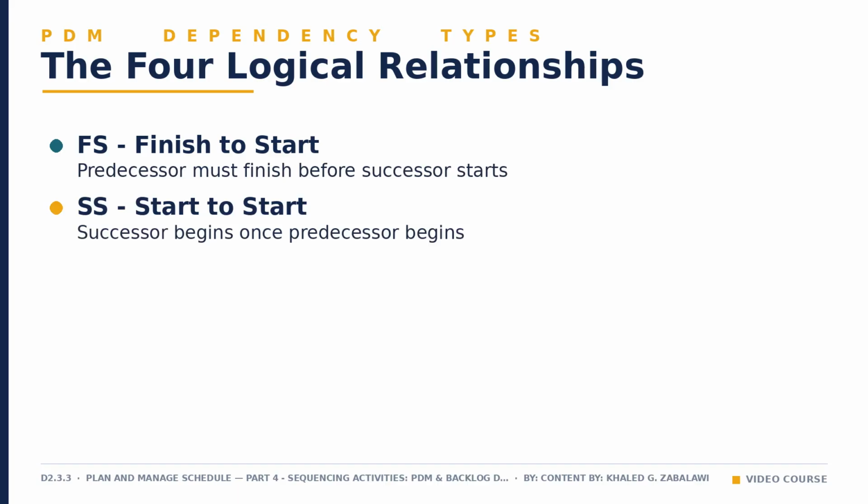Start to start means the successor can begin as soon as the predecessor begins. The two run together rather than one waiting for the other to finish. Testing might start as soon as development starts, even though testing finishes much later. The link governs start timing, not completion.